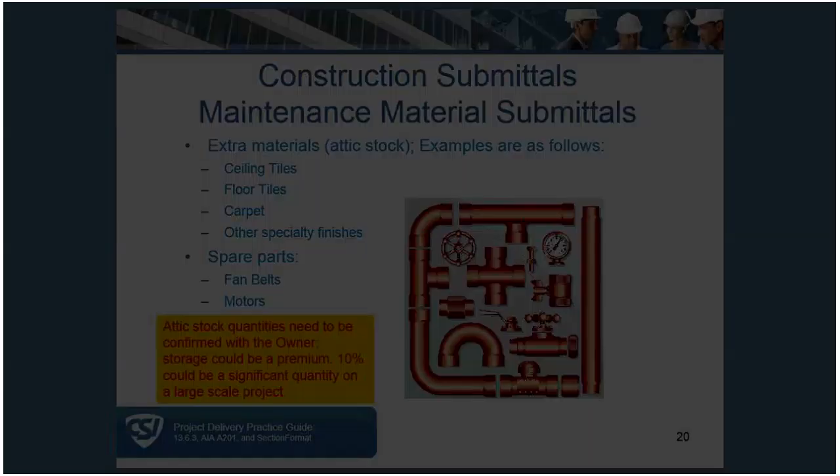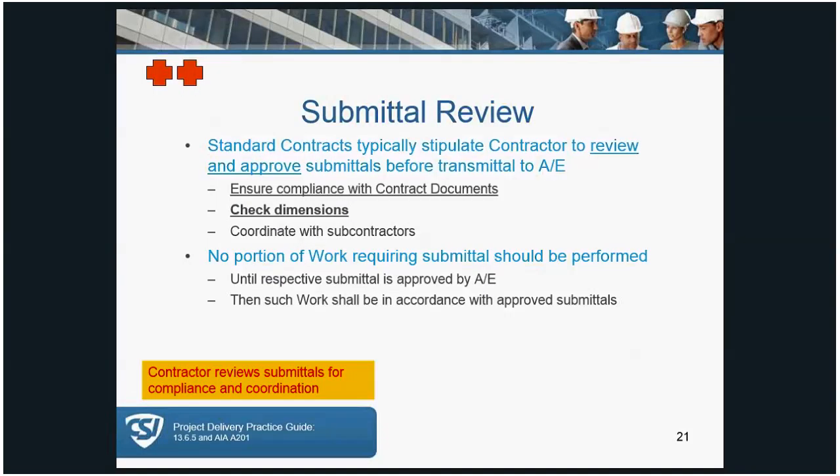Next slide. The submittal review. The A201 contracts require that the contractor review and approve the submittals before transmittal to the AE. That's a very important concept. You'll see there's a double red plus sign here.